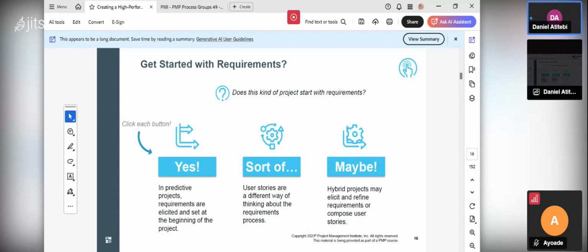If I use my example, that I want to build an application software which is broken down into modules, module one will be account receivable. That first one is what the team are going to prioritize, because the owner of the project or the user say, this is what we want first, this is more important to us now, and that is what we are going to work on first, and that's the only work we are going to collect requirement for, so that we can quickly focus on that and do it and demonstrate it with them, and when we finish that, they can start using it, getting the benefit from that earlier.